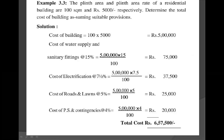Next provision: cost of roads and lawns at 5%. Assuming this provision, we take 5%. So cost of roads and lawns equals cost of the building multiplied by 5 divided by 100, equal to 25,000 rupees.